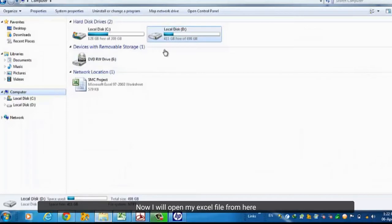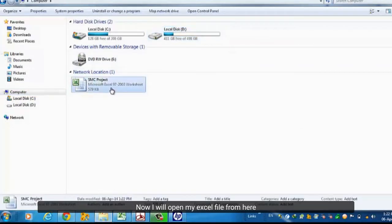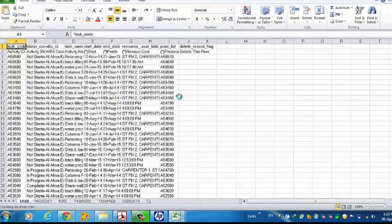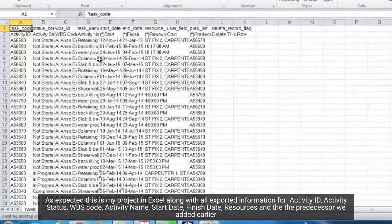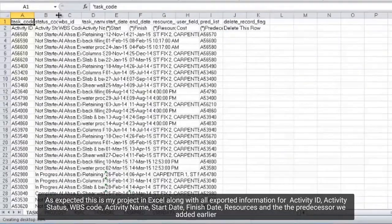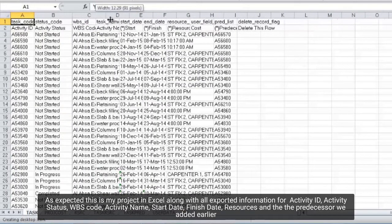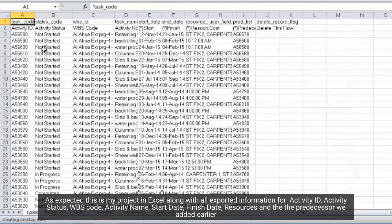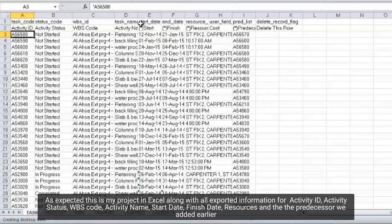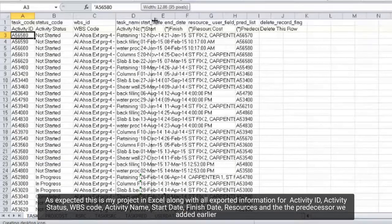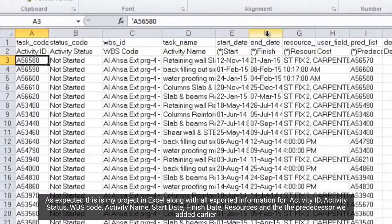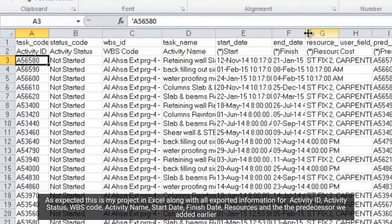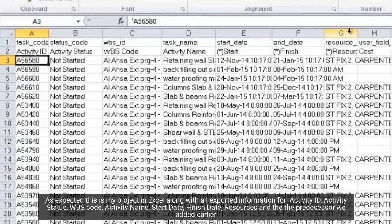Now I will open my Excel file from here. As expected, this is my project in Excel along with all exported information for Activity ID, Activity Status, WBS Code, Activity Name, Start Date, Finish Date, Resources, and the predecessor we added earlier.